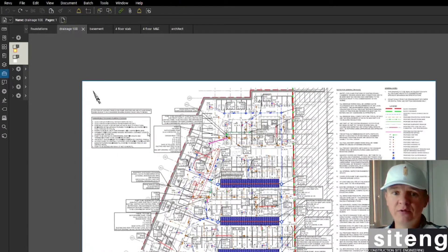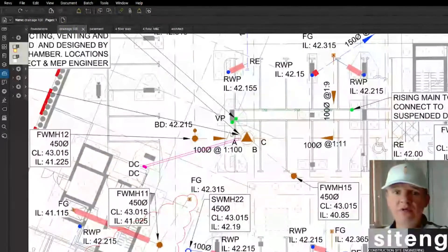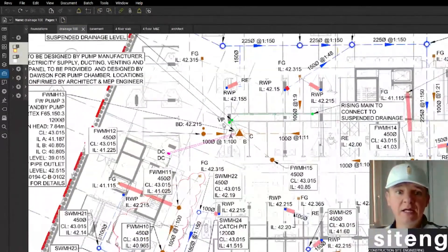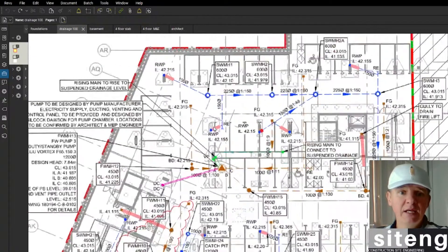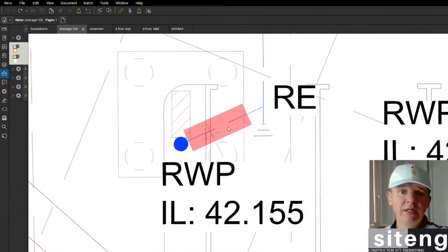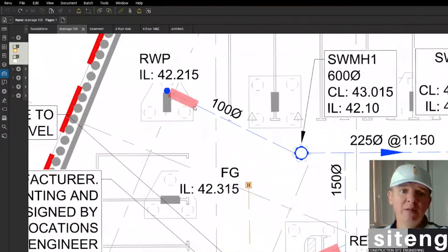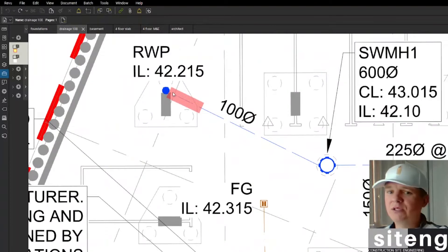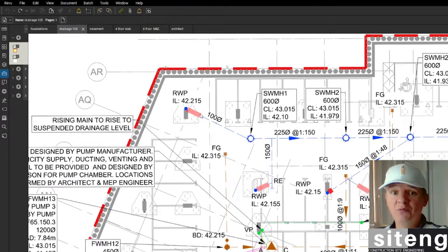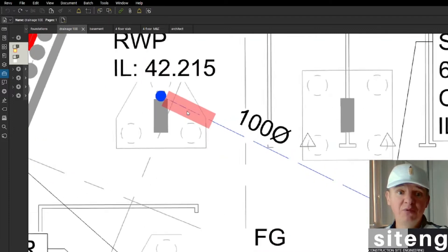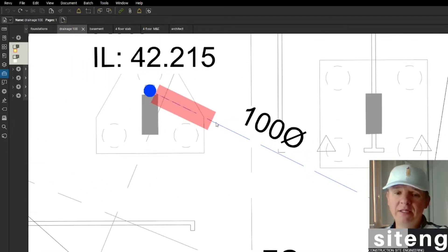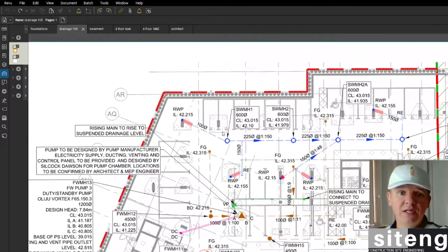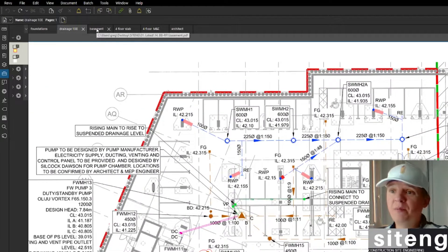I've got a nice drainage drawing here as well. The drainage drawing is actually quite good — there's full information here. What I like about this is that the designer showed us where the pipe is going to be going through our structural concrete. This is a very good thing, as missing this pipe while doing the pile caps is the worst thing that can happen and quite a big problem to rectify later.